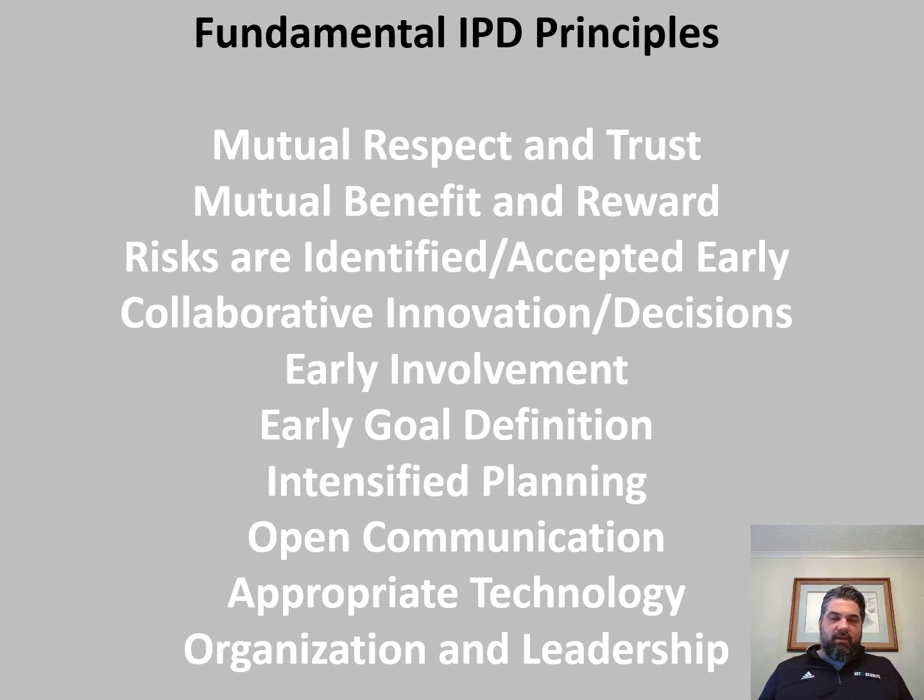The next IPD principle is intensified planning. So what happens is, because you've got so many more folks involved, the planning for the project really consumes more time. Why? Because you're dealing with more information. You're dealing with more decision-making folks. You're dealing with more alternatives in ways that you can address the project needs, which ultimately the project benefits from. The end result is better, but it does take more time.